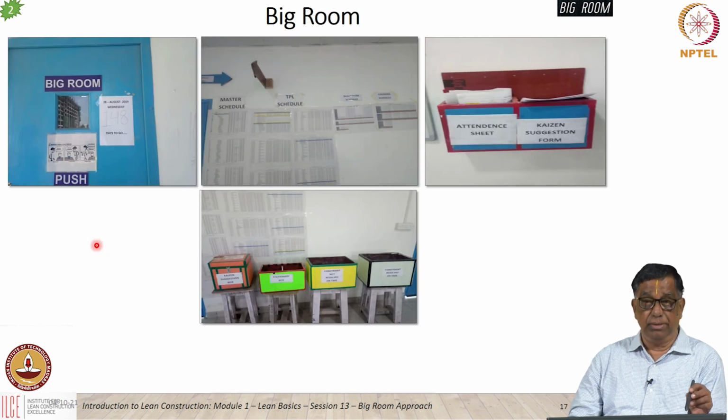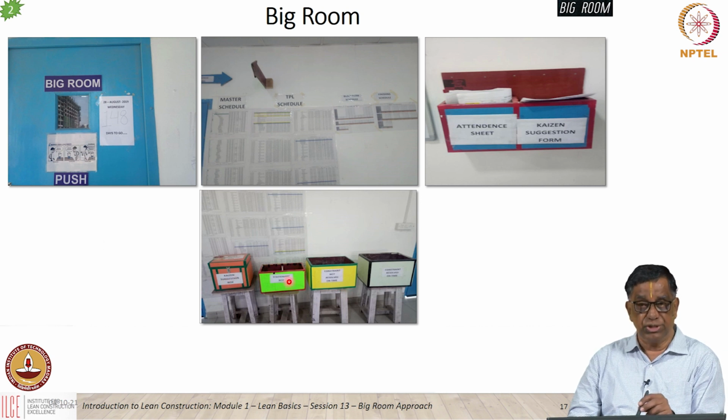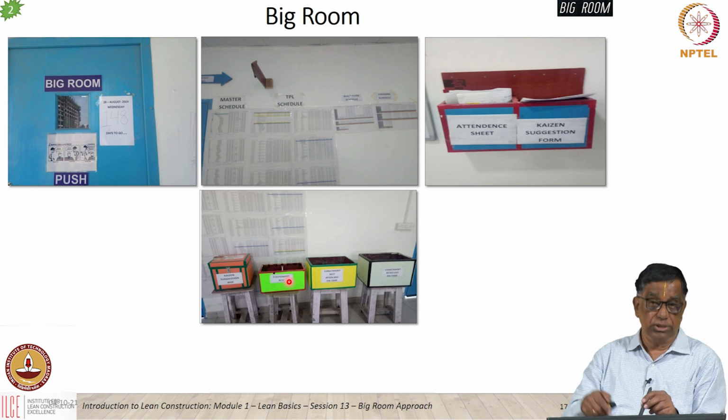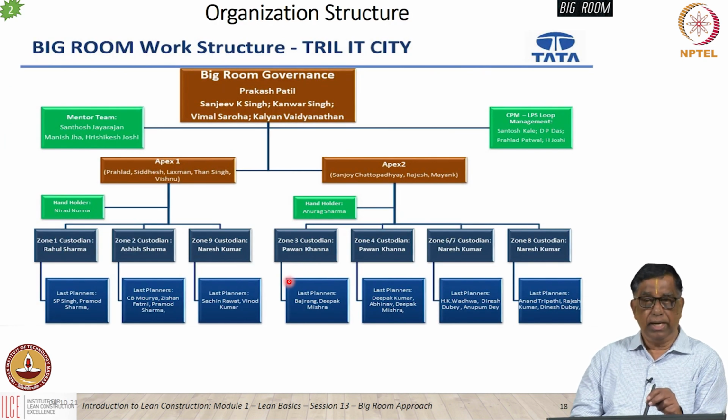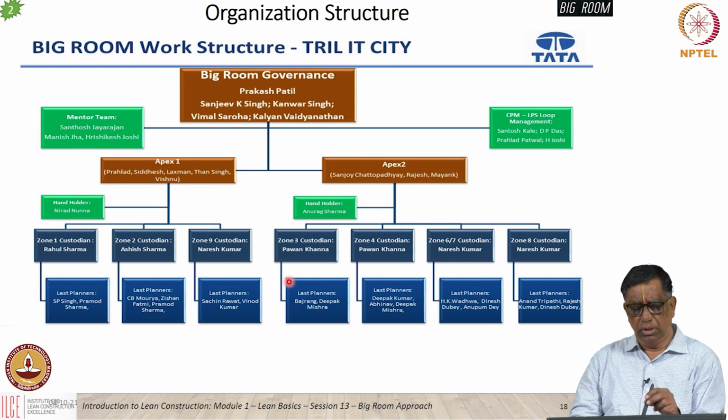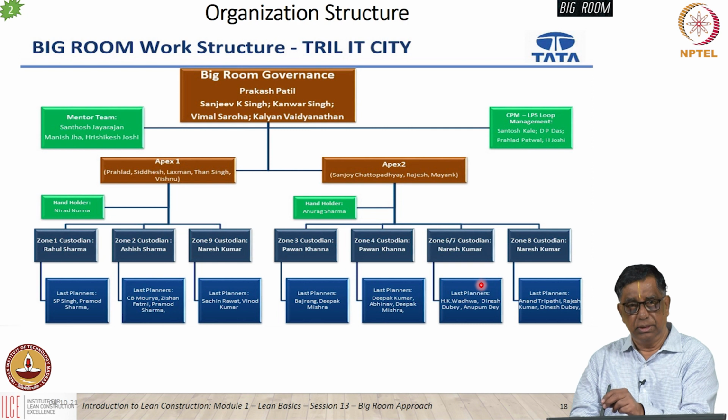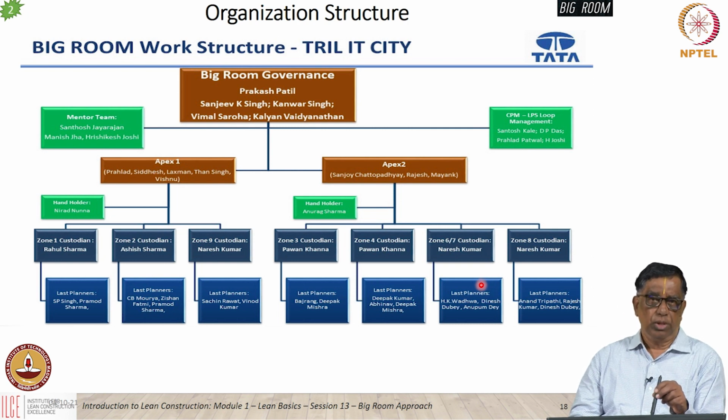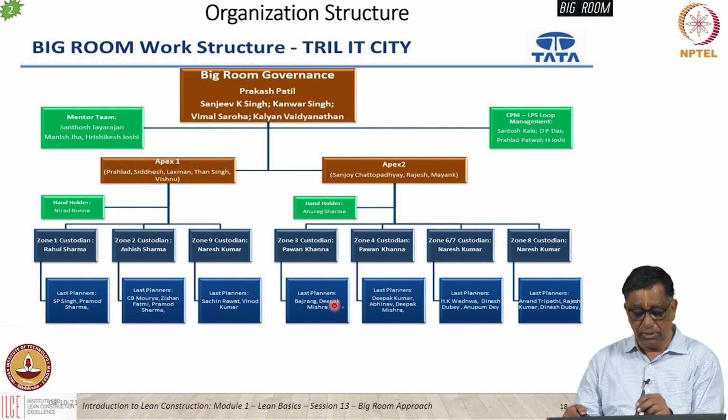And they had actually big room attendance sheets, and they had suggestion boxes on the various issues, so people can even put in their suggestions before or after or later, on the various issues being considered in the big room. And they had a good organization structure, the overall coordinator or boss for the big room concept, and then for the various buildings they had different coordinators like that. So the big room actually was used not only for discussing in general, but also for doing the very project management itself. That's why they had so many different organizers